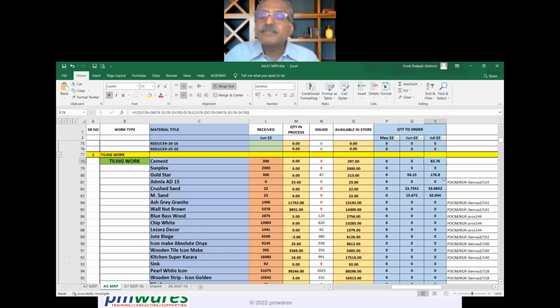So that means before July, because cement is a little fast and it comes in a week's time, you should order at least 15 days in advance to get the minimum 82 bags. But you will not order 82 bags, right? I told you that you have to match the purchase pattern. They cannot purchase 82 or 85. They purchase either 100, 200, 500, something like that.